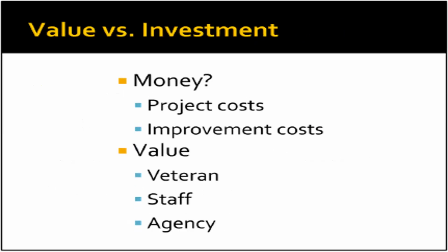However, there are other types of value that can be considered to be equally important and should be measured as a part of any major project decision. In healthcare, three major value groups that you should consider are the patient, the staff, and the facility. Value to the patient can be measured in terms of safety, effectiveness, and timeliness of care delivered. Values important to staff generally include things such as safety, satisfaction, leadership, and culture. Value to the facility consists of commonly known measures such as compliance, revenue, efficiency, reliability, and meeting the mission. Ultimately, the value of something is determined by how much it matters or relates to the decision being considered and those making that decision.